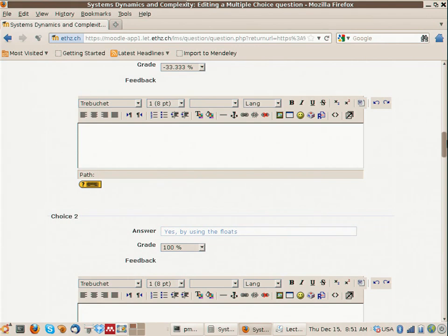So based on experience, you define the weights for the different cases. But with the critical path method, you can still incorporate a limited notion of uncertainty, which is basically your intuition. You know how variable your task is going to be. I understand it's a bit confusing. I have a memory of mentioning that floats can be used to incorporate uncertainty in the time required for the activity, but it's definitely not explicitly mentioned as a bullet point in the slides. So yeah, but this was the reasoning here.